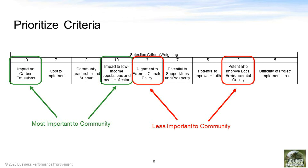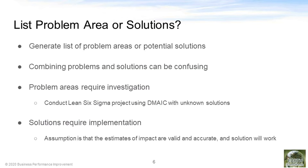We encourage you to use all the stakeholders involved to help define the ranking of these criteria. One question that comes up is whether you should be listing problem areas or solutions to implement. If you combine both problems and solutions together, it can be confusing, as the solutions already have some implied return on investment or impact and are more exciting to work on, while problems don't have that well defined yet and often get left behind in the scoring. When you list just a problem area, that means you're going to require some investigation into what the best solution will be. This is often how we use Lean and Six Sigma projects, using the DMAIC model to determine what the best solutions will be.